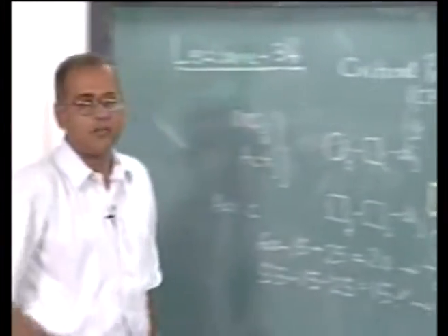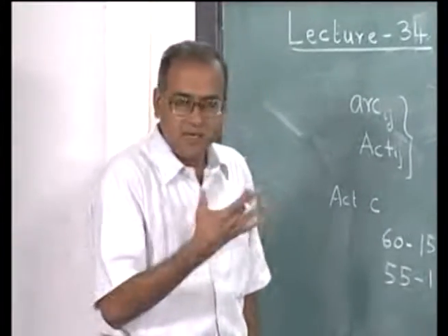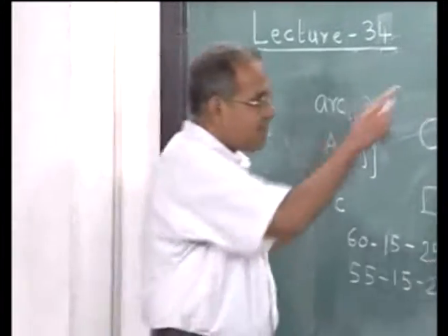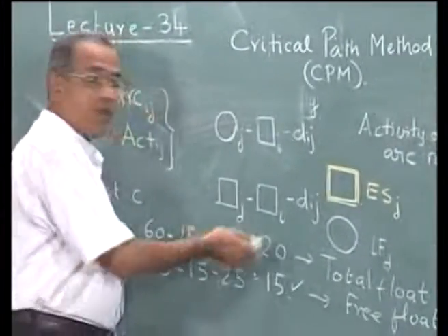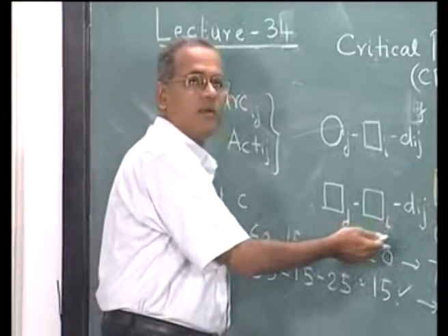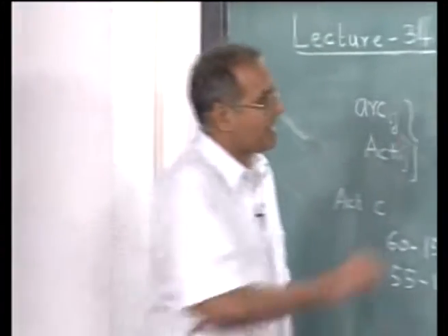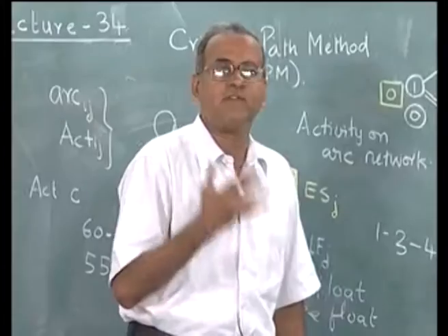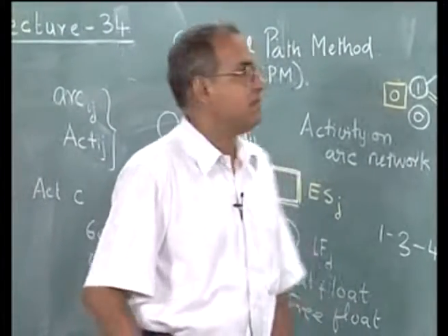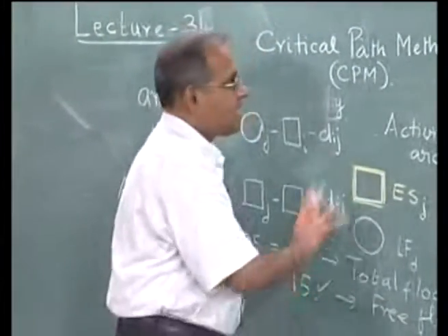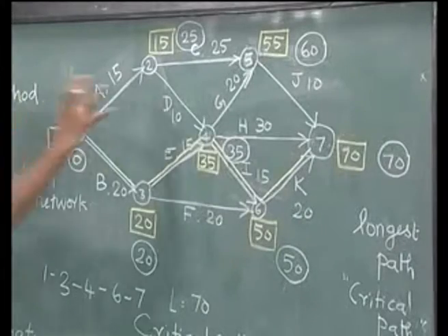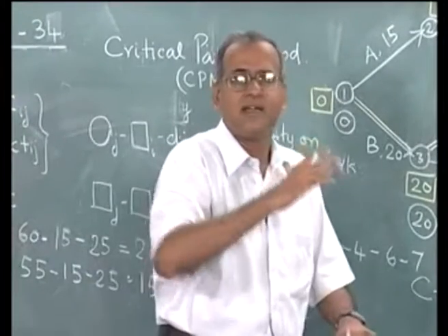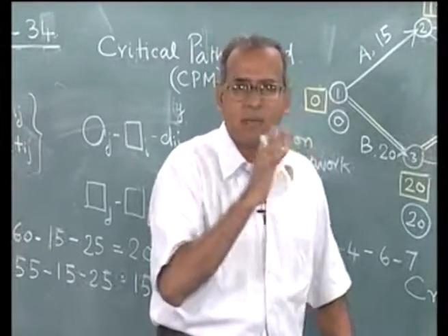Now, both these total float and free float in some sense tell us the excess time that is available, and by the way these numbers are written down, the free float is always less than or equal to the total float. While the total float tries to tell us the excess buffer or total buffer which can be used, which is 20, somewhere 15 can be used comfortably for this, and if it stretches beyond 15, it will still try and affect something somewhere.